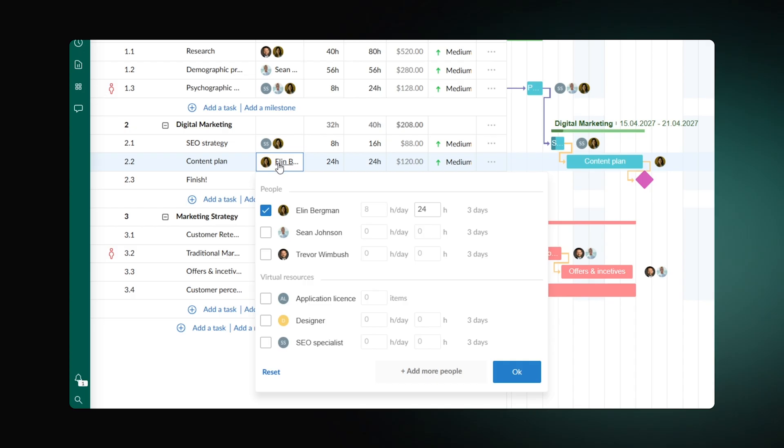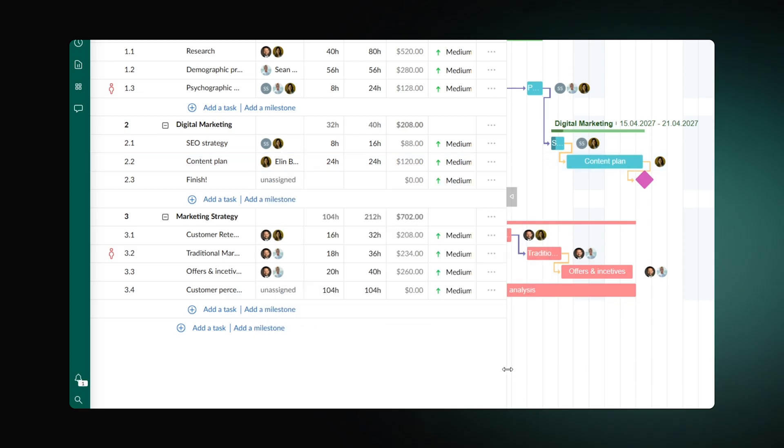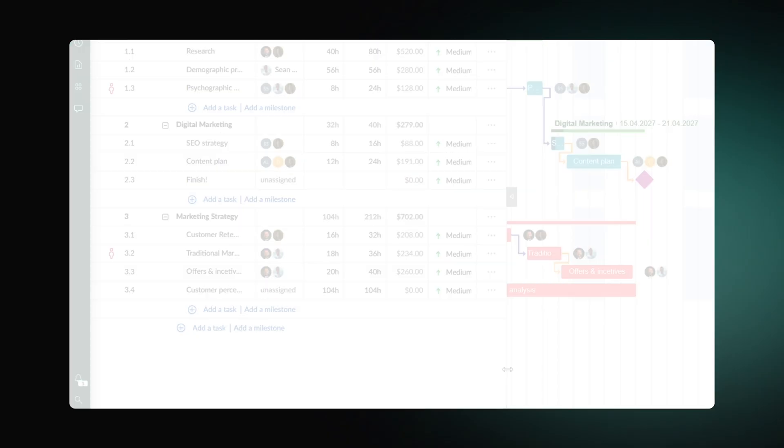GanttPro allows for easy collaboration with your team members and enables to keep track of the resources they need. Just invite your team, assign tasks and calculate costs by setting rates and units.